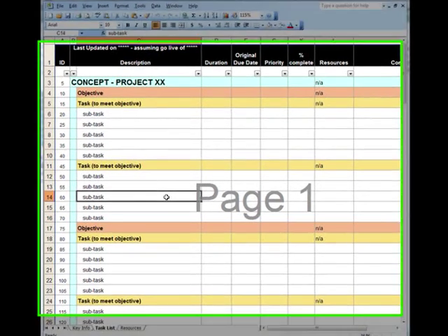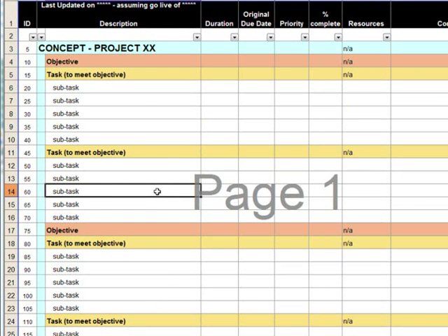A spreadsheet is one means of recording your work breakdown structure and allocating resources. It's not a Gantt chart, it is simply a static list of tasks where we can record the durations of the tasks, the percentage complete, the resource allocations and any comments, etc. It is designed so that it can be copied and pasted into a software product that may manage the Gantt charts if this is deemed necessary.